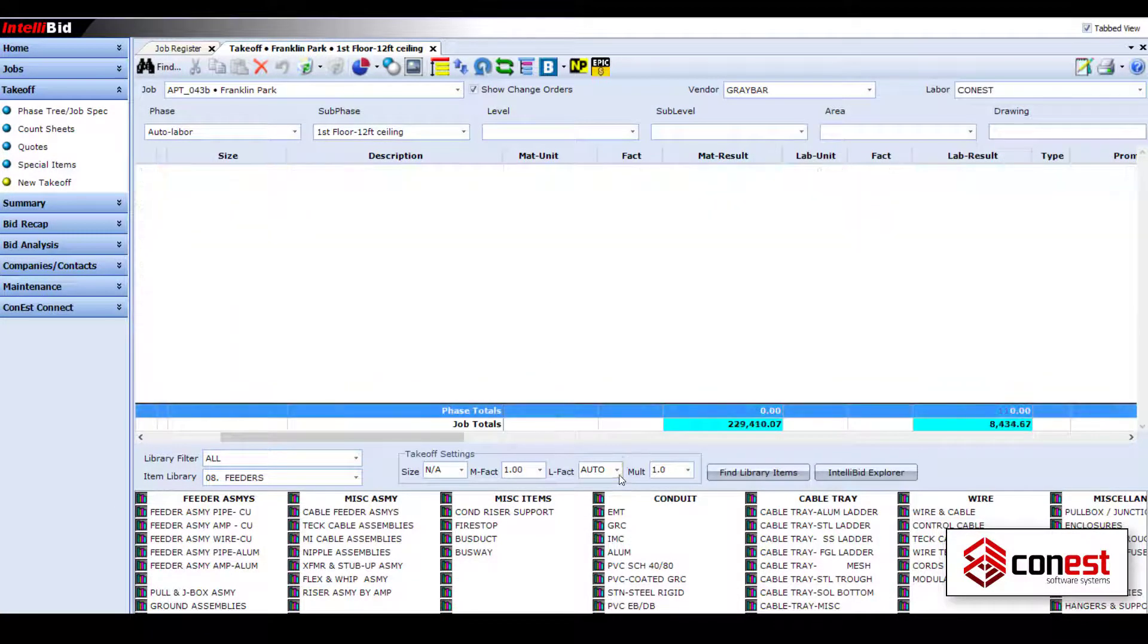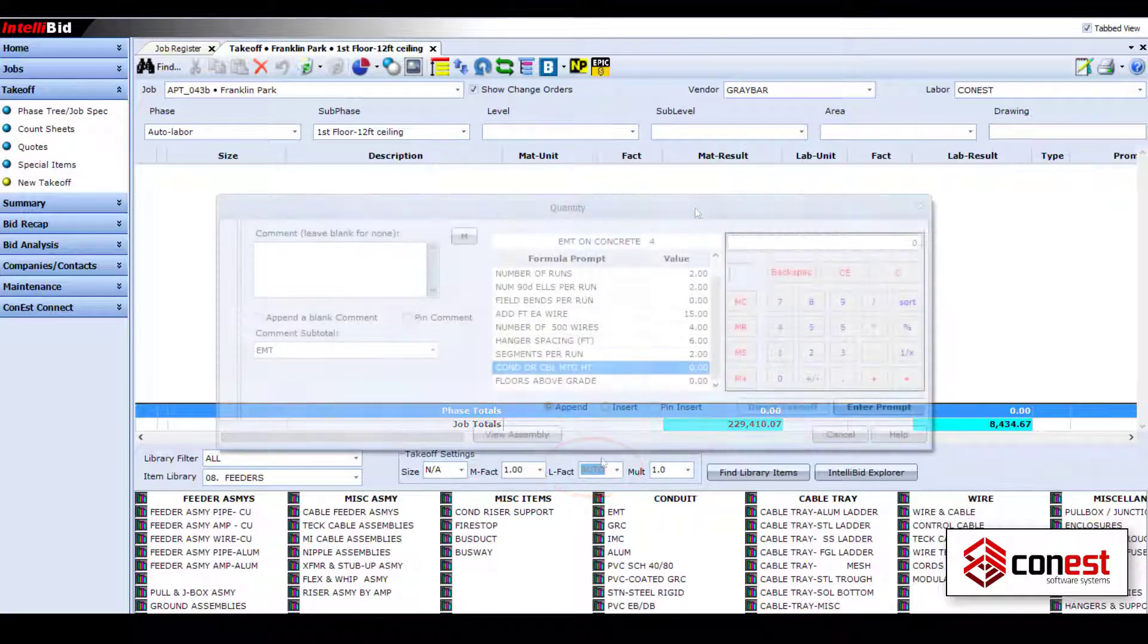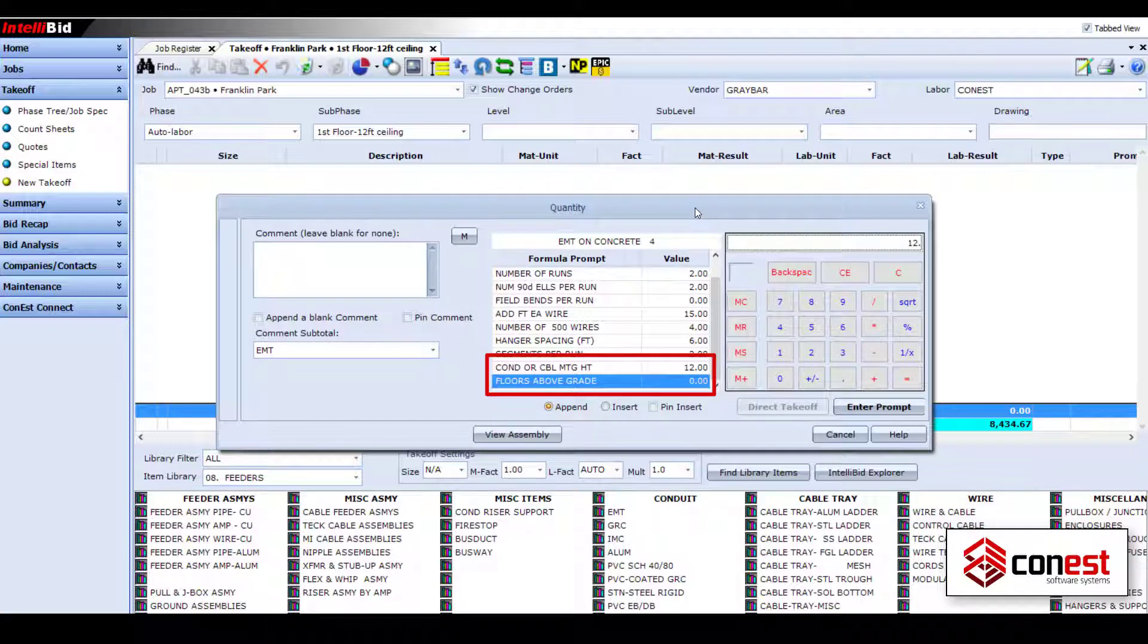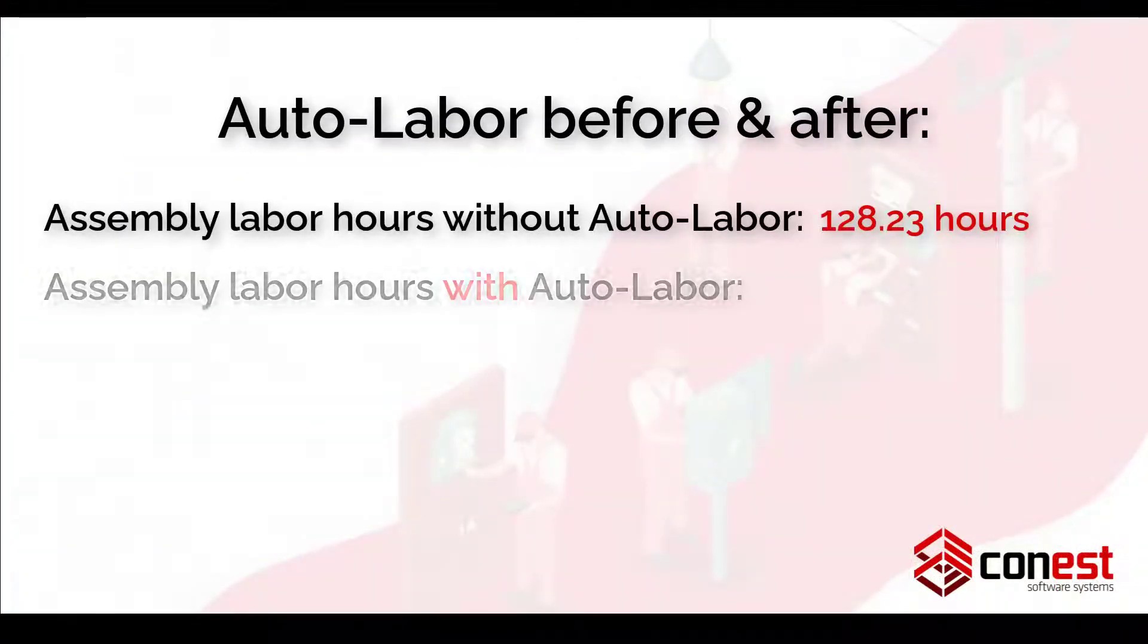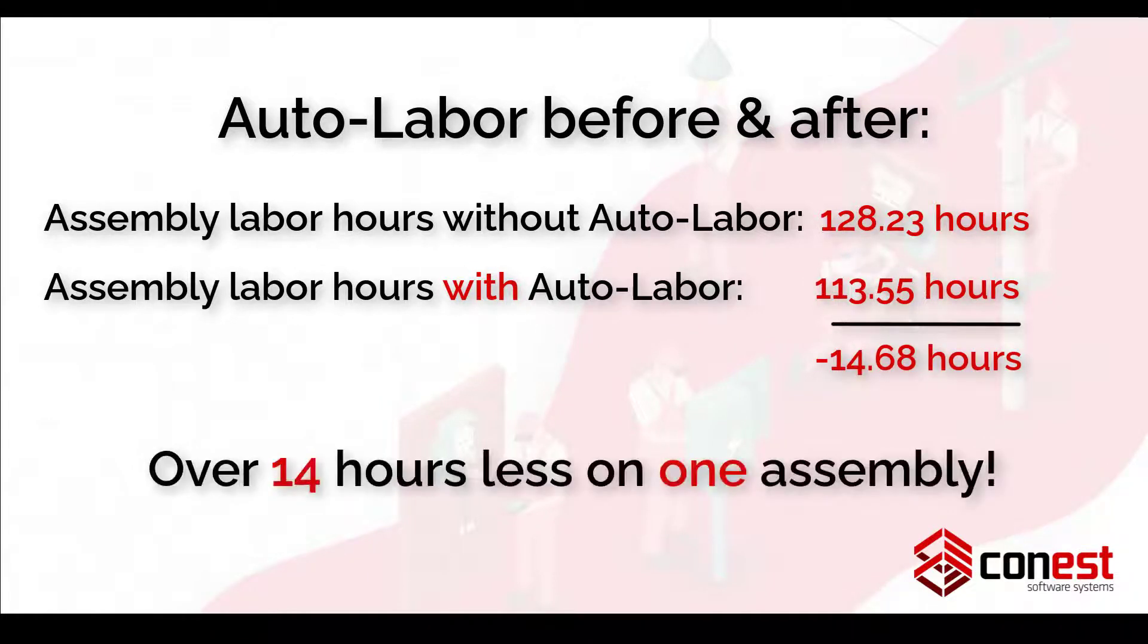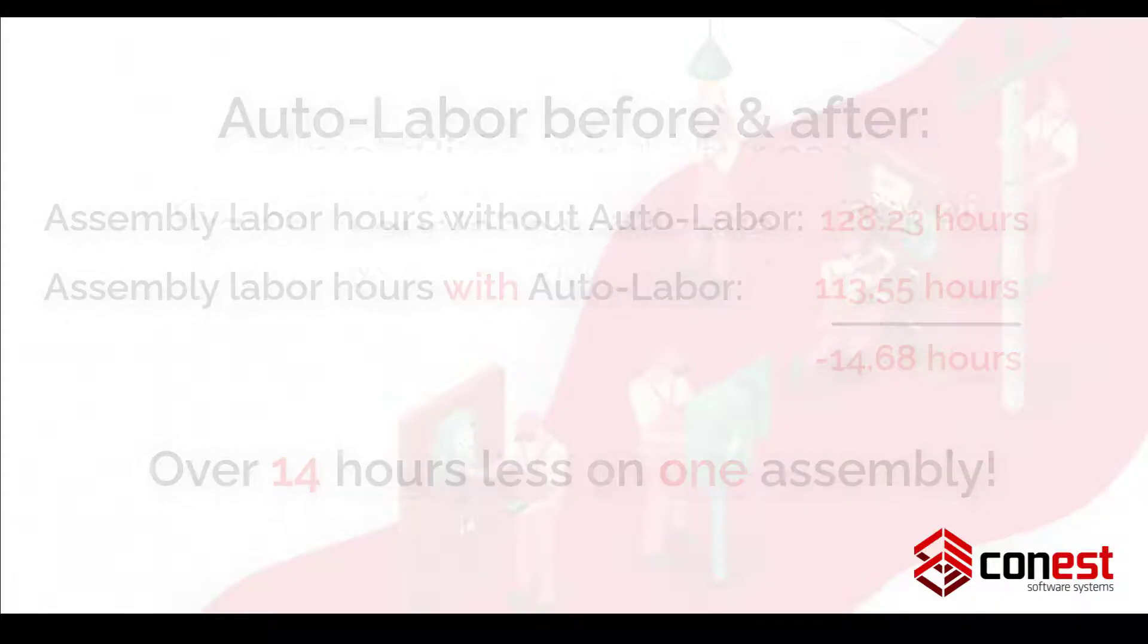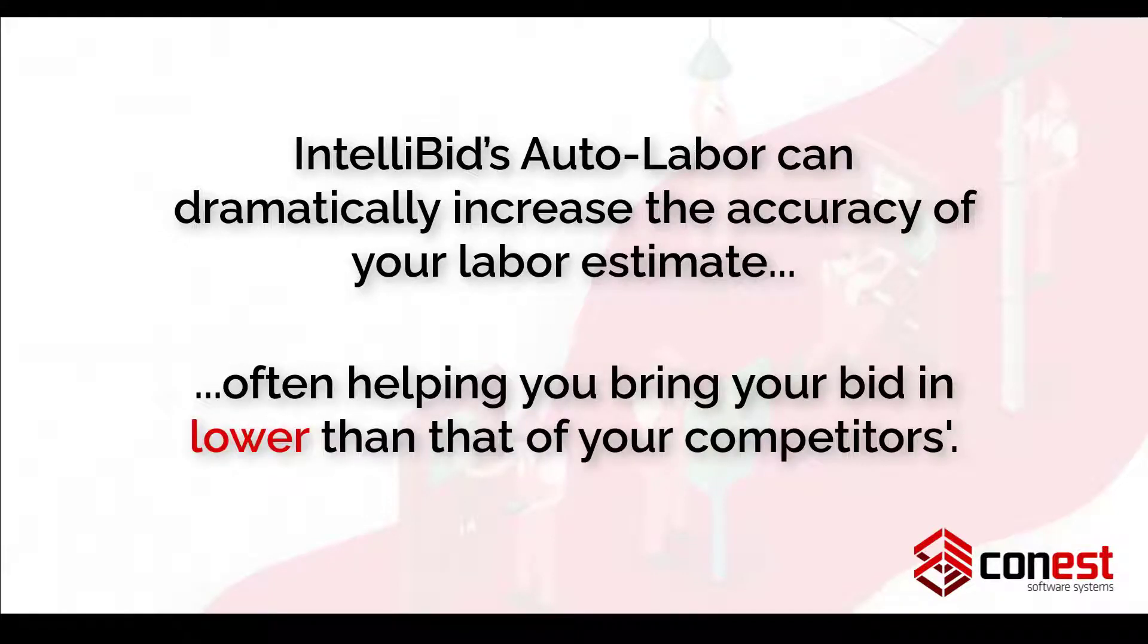Utilizing Auto Labor is as easy as enabling it when selecting an item assembly for takeoff and answering a couple of extra questions when entering the quantities. Often, the adjusted labor is less than the default labor factor for an item assembly, giving you the opportunity to safely bring in your bid below your competitors. Auto Labor can dramatically increase the accuracy of your labor estimate, often helping you bring in your bid lower than that of your competitors.